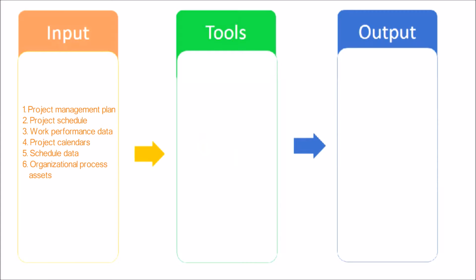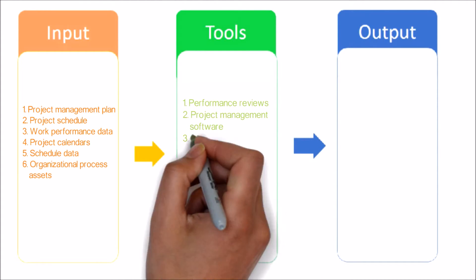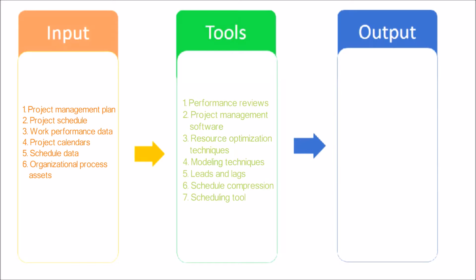Organizational Process Assets. Next, let's have a look at tools and techniques used in this process. Performance Reviews: Performance Reviews measure, compare, and analyze schedule performance such as actual start and finish dates, percent complete, and remaining duration for work in progress. Project Management Software: Project Management software for scheduling provides the ability to track planned dates versus actual dates, to report variances and progress made against the schedule baseline, and to forecast the effects of changes to the project schedule model.